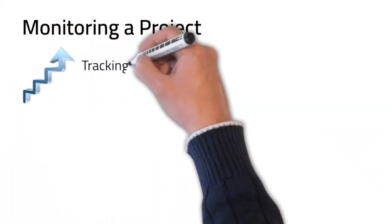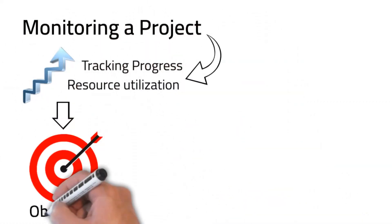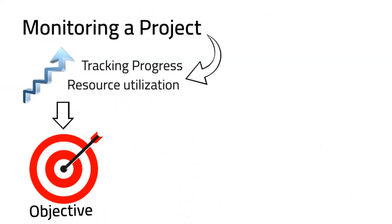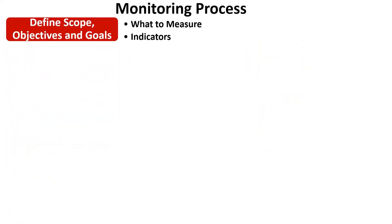Monitoring involves constant tracking of progress, performance and resource utilization over time to ensure that the project is on track and meets its objectives. The first step in monitoring a project involves clearly defining the scope of the project. Defining the scope, objectives and goals will help us understand what and when to measure, and will also help us establish the metrics and indicators that can be used to monitor the progress of the project.